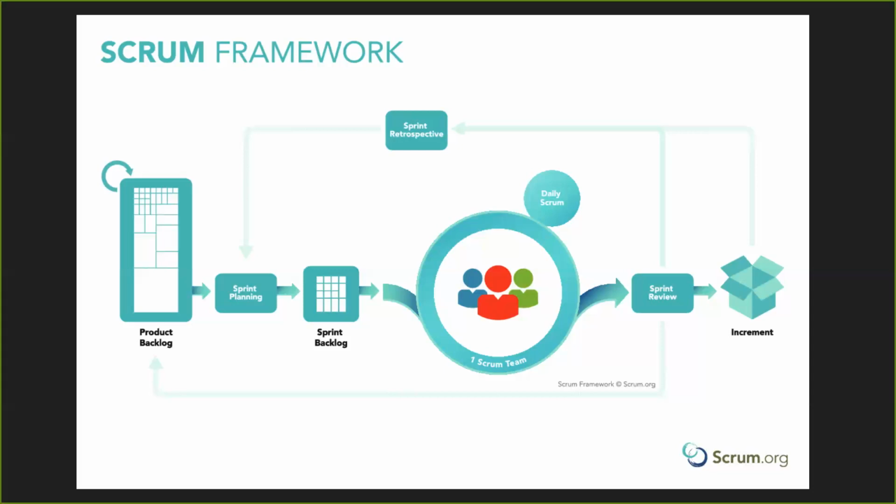And that's really important. And so that goes back to these estimates that you make on the product backlog, the story points is what they're called. So when a team first starts off, they may only be able to address, say, 5 or 10 story points at a time. But as the developers grow and they figure out how to work together, the number of story points they can implement increases rapidly over time.